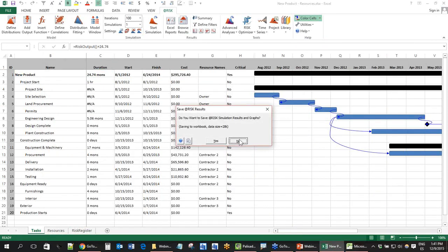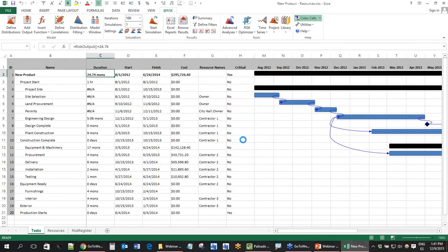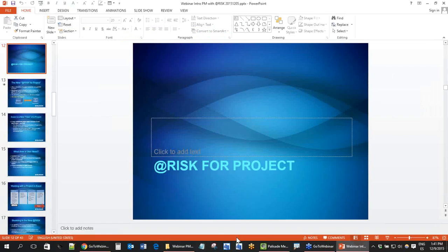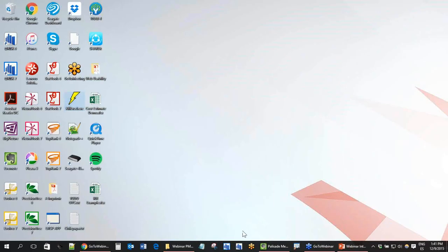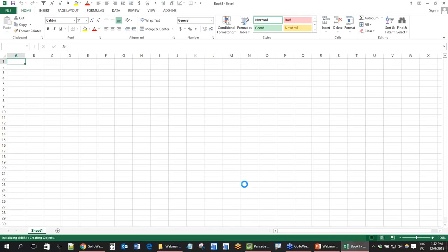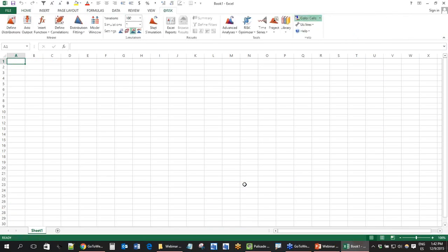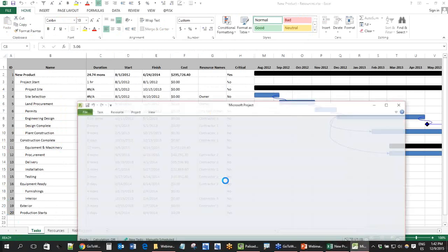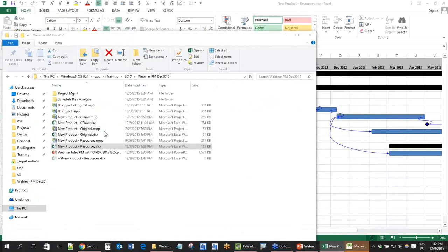So what happens with milestones? Milestones cannot have a distribution, right? They are just a consequence of some activity before, right? And the milestones are going to move, right? So you can put an output on the date of a milestone, and if that date has uncertainties that move that particular date, that date can be a distribution, but a milestone itself cannot be defined as a distribution. This is one thing. Another thing that is really important as well is that you cannot have distributions in the aggregate tasks, right?